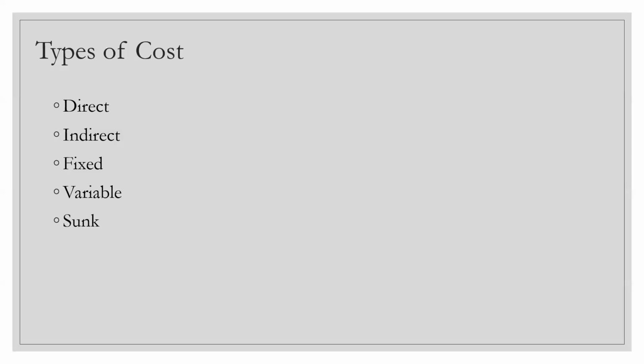All right, now let's come to fixed cost. Fixed cost is something where, let's say you are hiring a person who is a permanent employee of your company. So you basically know the cost of the resource, right? You know the entire cost of the resource for the next 6 months or 1 year, and that will be billed to the client, right? So these are the fixed costs when it comes to a permanent kind of thing, which is not going to change in the future.